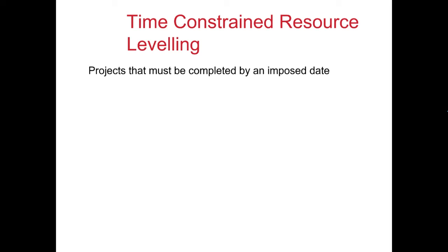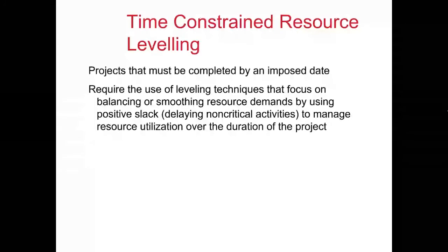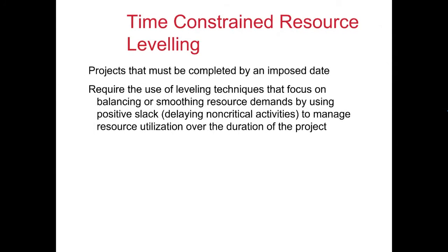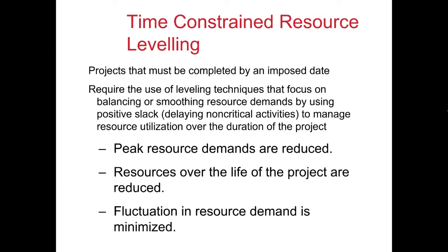So in time constraint projects, the projects have to be completed by an imposed date. It requires the use of leveling techniques that focus on balancing or smoothing resource demands by using positive slack or delaying non-critical activities to manage resource utilization over the duration of the project. And in time-constrained resource leveling, your peak resource demands are reduced, and fluctuation in resource demand is minimized.